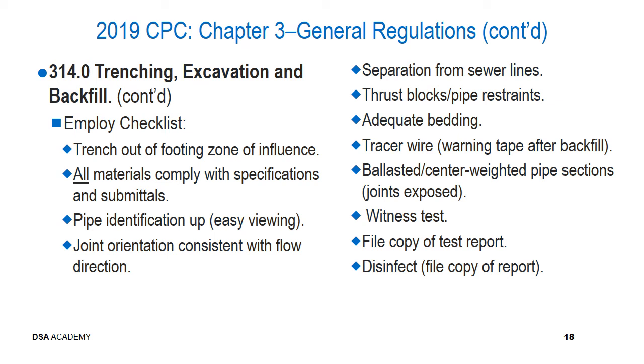Make sure that the subcontractor that comes in to do the disinfecting has the appropriate certifications, has the appropriate documentation, completes the appropriate documentation, and definitely, similar to the test report, receive a copy of the report and file it in the most appropriate folder in your job file.